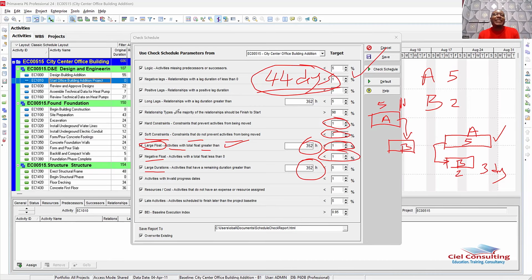Come on, it's an activity, it's not a project now. How can one activity itself take you 100 days? When there are some major projects that we do in less than 100 days, especially if you're running an agile project. So please, if you have all those large chunks of activities, DCMA is simply saying, please break down your project activities into small manageable chunks, because the smaller they are, the easier it is to manage the activities.